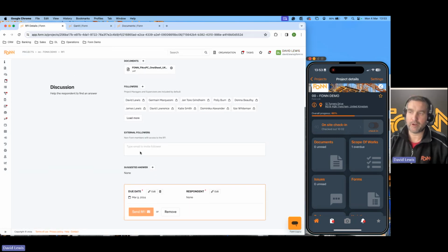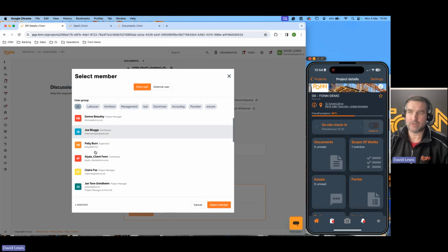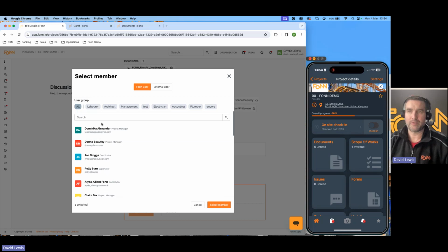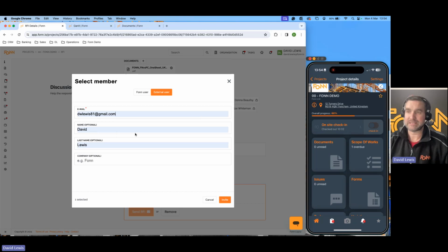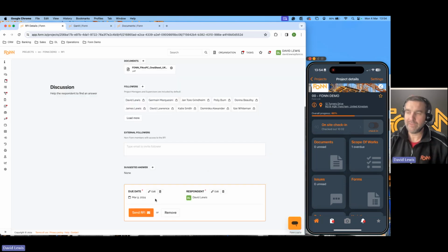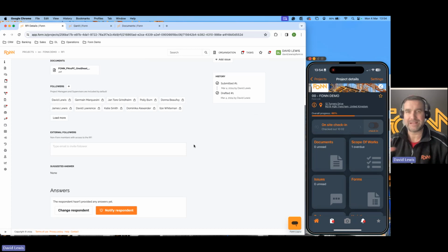We can add any other followers in, put a suggested answer, put a due date, and then a respondent. So who we're sending this RFI out to for supplying the answer. Here I can select anyone who's one of my project members. The good thing with Fonn, the same as with how it works for submittals, is we can send it to any external user. So we can send that out to anyone that we want to. They don't have to have an account on Fonn to answer submittals, answer RFIs, anything like that. So I can send that RFI out to them. They'll get an email with a link that they can reply to. Then that'll pull that answer straight back into the system for us.